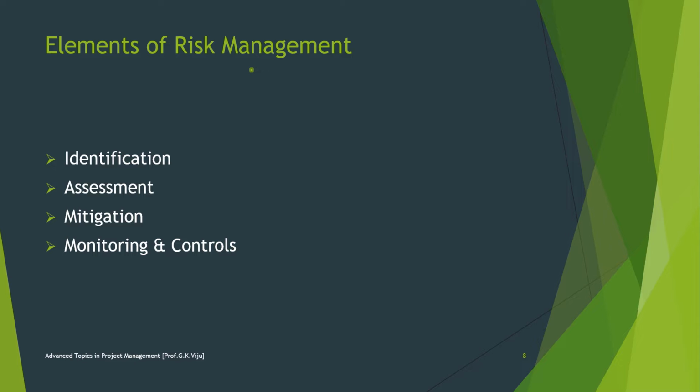As I mentioned already, not all risks are equal. Some risk events are more likely to happen than others, and the cost of a risk can vary greatly. Evaluating the risk for probability of occurrence and the severity of the potential loss to the project is the next step in the risk management process.